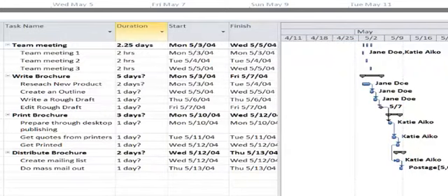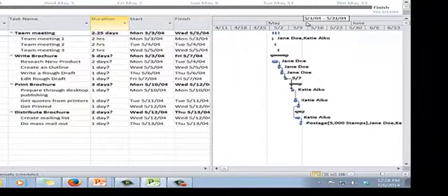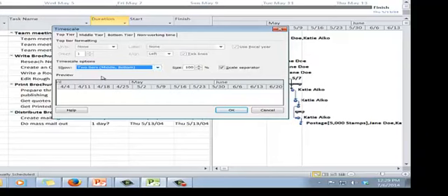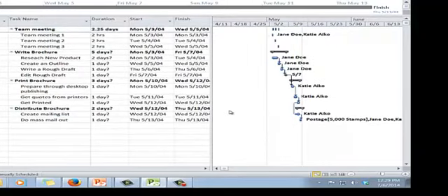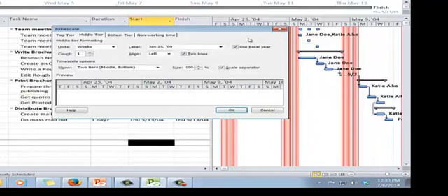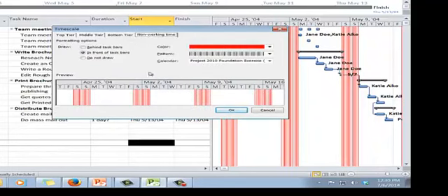Click OK. You will notice that there are no changes in the Gantt chart view. To make it noticeable, you have to go again to the time scale, remove the top tier, turning the 3 tiers into 2 tiers. Middle tier to month, bottom tier still to weeks, and click OK. You will notice that when you use the bigger time scale, the non-working time might not appear.